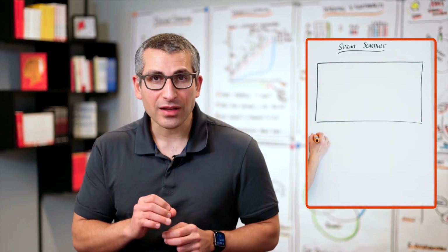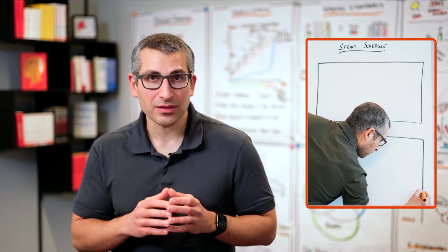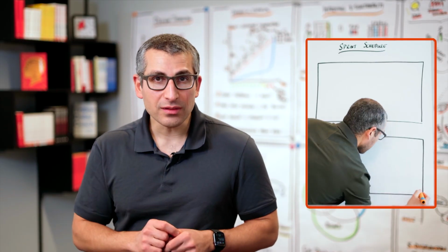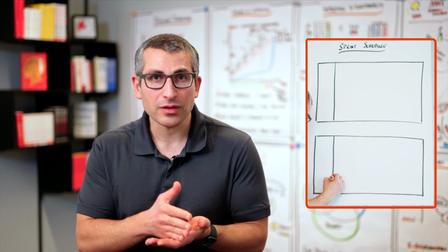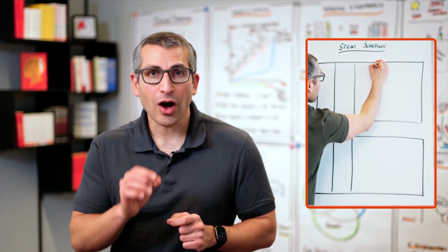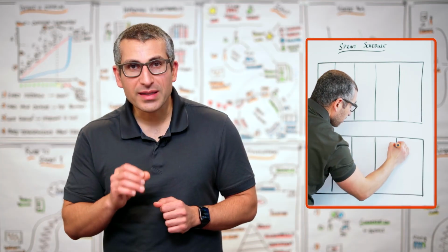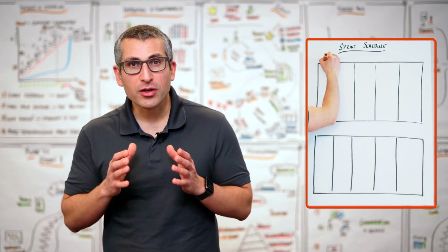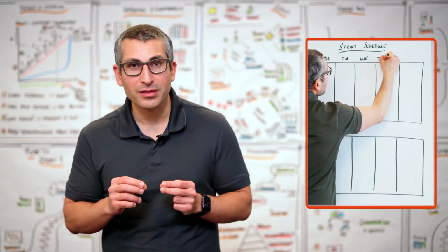And the biggest challenge for the sprint review is that stakeholders are not present. The most common reason, from my perspective, from my experience, is that we have scheduled the sprint review at a point in time which doesn't fit our most important stakeholders' calendar. One way to address this challenge is to schedule our sprint with our customers, with our stakeholders' availability in mind.